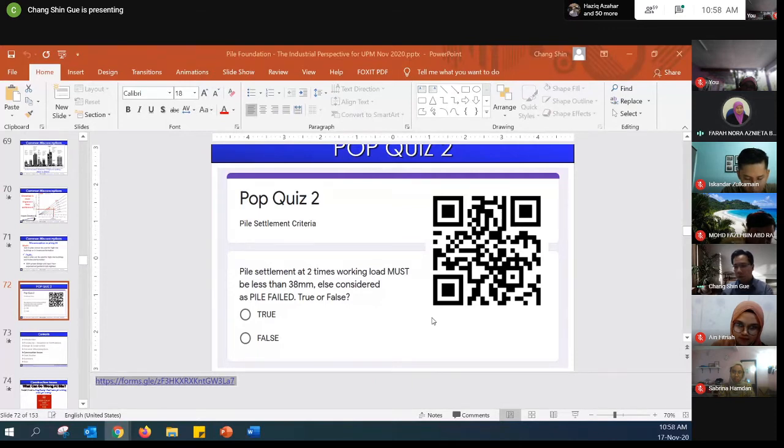How much per borehole? If you include the strength testing, for example the fracture test, typically per borehole will give you about 10,000, including tests, 10 to 12,000, including lab testing.